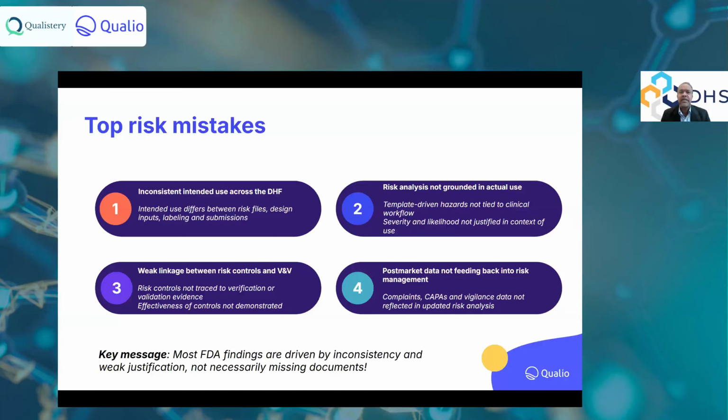In software, there are various ways, but at least with a test case, which is released before you do the formal run, as part of the test protocol. And then you have a result of the test protocol. You need to show full tracing. So tracing from the test report upstream to the test case, to the requirement, to the DUT, the software release or device release we are validating or verifying, and on the way back to risk analysis. Without all the tracing and linkages between controls of risk and proving it's effective, it's not complete. Many mistakes are made like that because of, again, clerical reasons, and that results, unfortunately, in slowing down of clearance